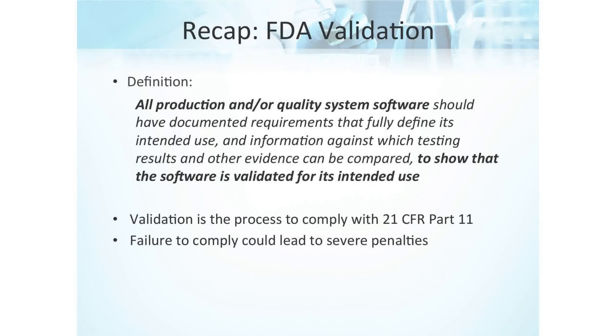You have to have a software development lifecycle that's actually documented and is demonstrated to be in use consistently. So your requirements and your design specifications have to be utilized consistently. You hear me harping on that word, consistent, and they need to be available for the systems under audit. If you conducted vendor audits or vendor evaluations, you need to prove that you conducted them because they were appropriate, and you need to have that documentation available.